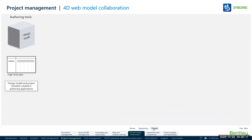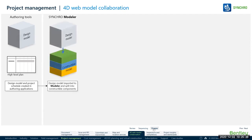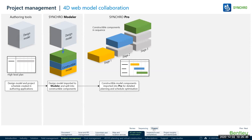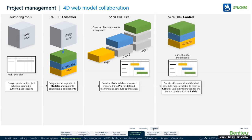As a process, how we bring those things together — everything starts with creating good content. There's now a wider array of sophisticated BIM tools that mean you can create very high quality data at the start of a project in the design phase. In Synchro, we take that design content and our project schedule and import it to Synchro Modeler to turn that design content into constructible content. Once we've done that, we take it into Synchro Pro, link it to a schedule, and optimize how we're going to build. It then gets put into Synchro Control to make it available to the wider audience.